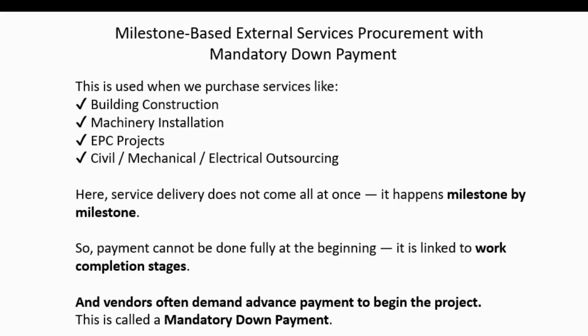Here service delivery does not come all at once. It happens milestone by milestone, so payment cannot be done fully at the beginning. It is linked to work completion stages, and vendors often demand advance payment to begin the project. This is called a mandatory down payment process.